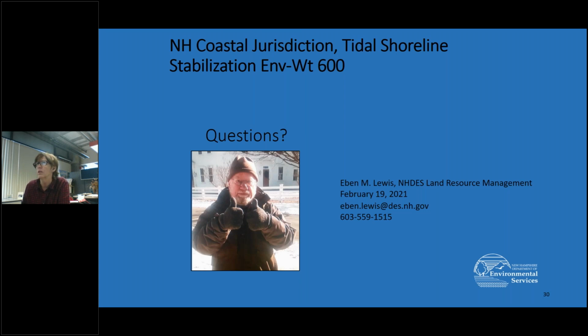So there's one question here. It says, and I think I'm going to answer this if that's okay. It says, should a length of a road be abandoned, will permit fees for permanent disturbance be waived, or at least considered for future policy? So the fees are set by statute, and so the department does not have the authority to waive that. There is a rules waiver process that has to be consistent with the statute and rules in ENV-W2 200.